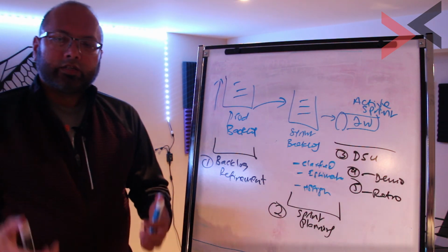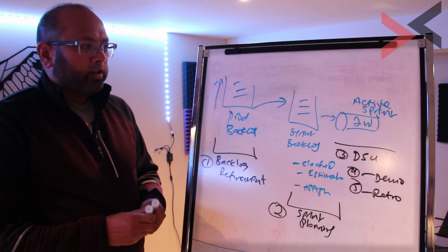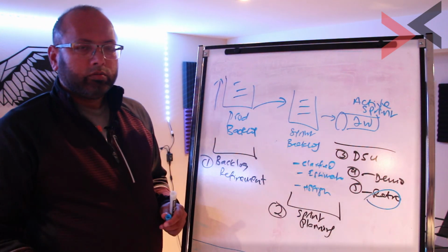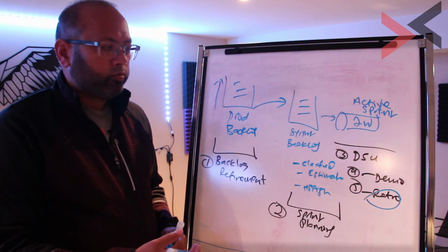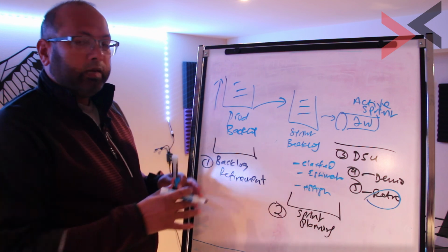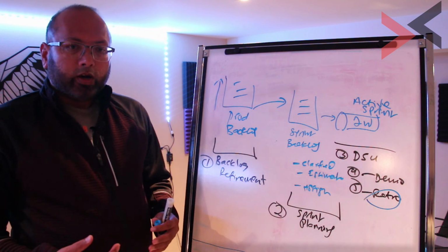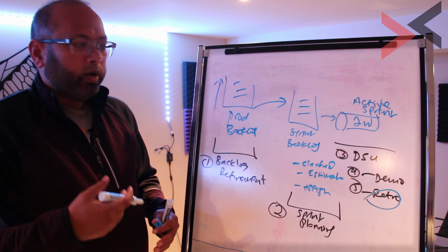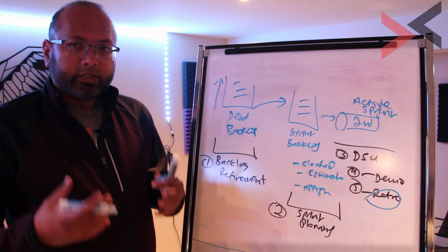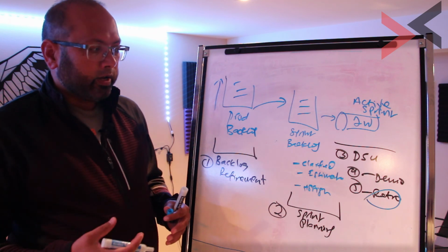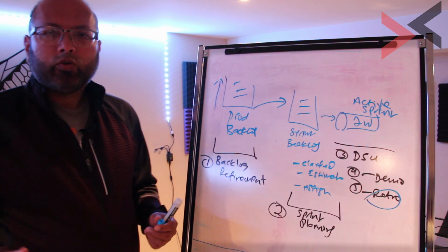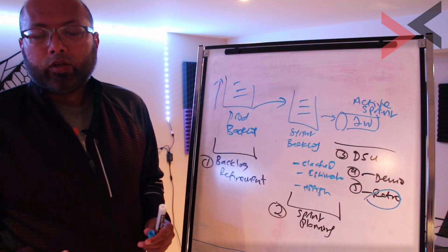As a Scrum Master, a tip I can give you is that most likely the team might say to you, hey, I don't need my retro. Let's just do the demo and move into next sprint. No, don't do that, because a retro is a time for the team to reflect on what went well, what can they improve on, and anything they want to do as a continuous improvement. It's a way of relaxing, understanding, so that they don't make the same mistake over and over again. So it's important to do the retro. You must do the retro. And it doesn't have to be hours or 2 hours. It could be 45 minutes, it could be 1 hour.